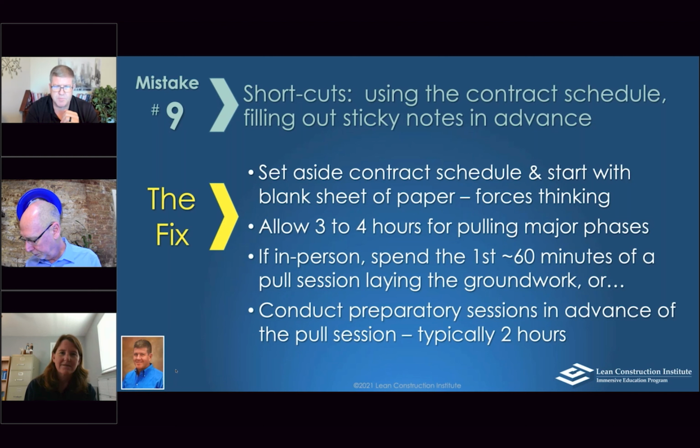Even if I'm doing an in-person pull plan, I'll do a virtual setup session and then get together in person to actually do the manipulation of the stickies and making the commitments. Those setup sessions usually can take an hour and a half to 2 hours. I would expect to do those. It's not as clean and simple as a lot of people think it is. And so in general, don't try to take shortcuts.